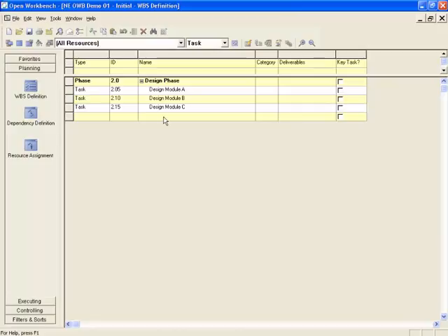And then the next step is I'm now going to do a milestone, and I'll drop this one down, and I don't see the milestone. Where did the milestone go? Well, that's the way it opens up, and you need to pull up the scroll bar and come up to milestone, and then we'll put that in there. Often people use a slightly different numbering scheme for milestones, so we put it like 2.99 rather than keeping the sequential scheme going along. And here we'll say design phase complete.